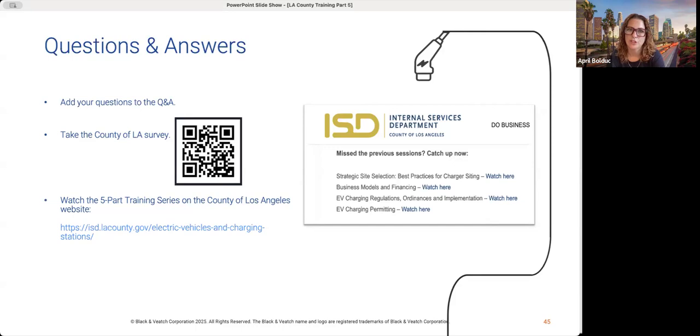I think it's really talking with your local engineer, your local consultants that are helping guide you through that process, as well as talking with the city. They'll have some great best practice information for you, the city or the county. And then also the utility. Like I said, even taking that early desktop review design that we showed you there with the fleet and also the public and employee, just taking a design like that to your utility to ensure that, okay, yes, there is the needed capacity in that particular area, or they'll explain to you the type of upgrades that they'll need to make and any costs associated with that.